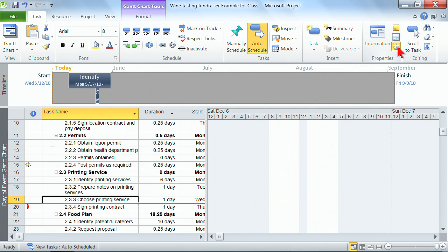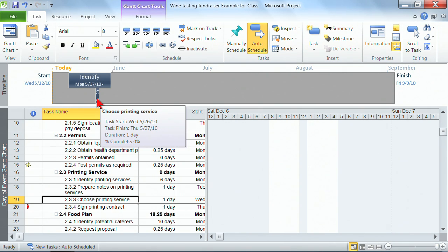Now what I want you to notice is it happens simultaneously, so visually I can identify that I've asked the same person to do more than one task that happens at the same time. But I'm okay with that, and they're okay with that, it works. And I also want you to notice that you can't read everything on it because this task is 1 day in duration, where the other task is longer in duration.